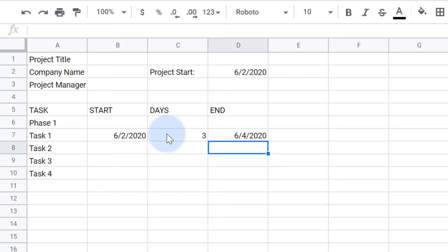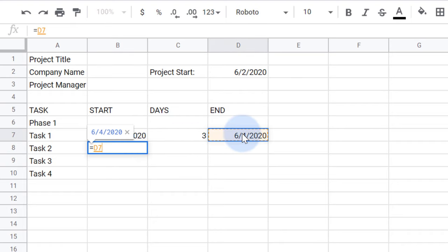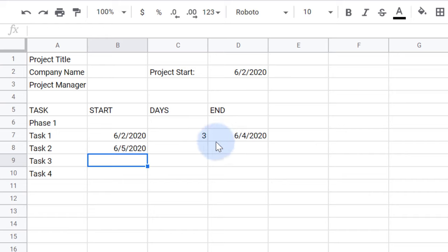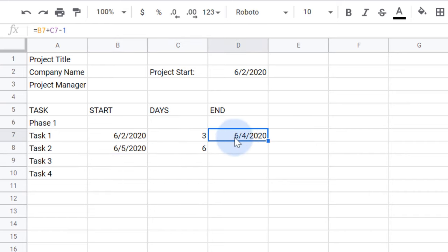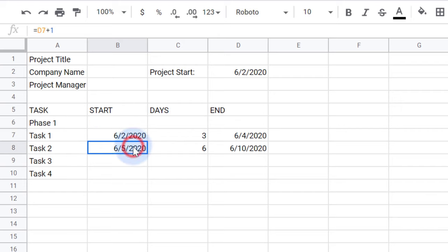I'll have task two start one day after task one ends. Now I'll fill in the rest of the data for us to work with. You can add and subtract dates because they are stored as numbers and just displayed in different formats.